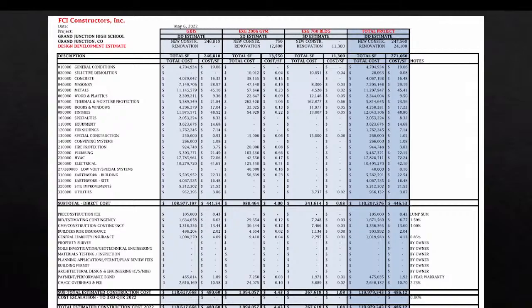Design development drawings. Basically, we spent the last 6 weeks working with the DLR and the Blythe group and some of the ownership group, going through the design, looking at different features of the building, like marker board brands, and whether that is the right brand or price for this particular job, and really fine tuning those types of details. We looked at different areas that could be revised for better value, and we got down to what we feel is a really good design development estimate.